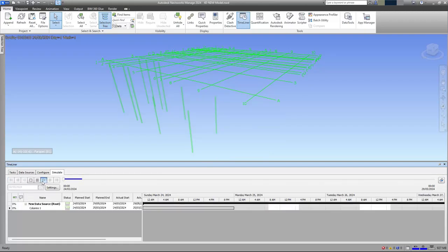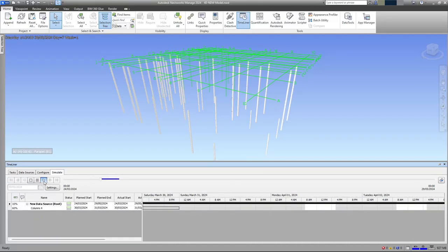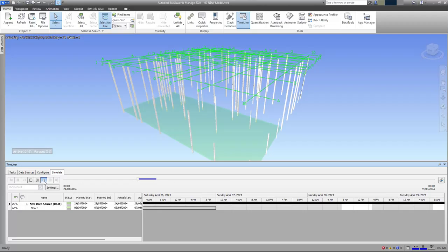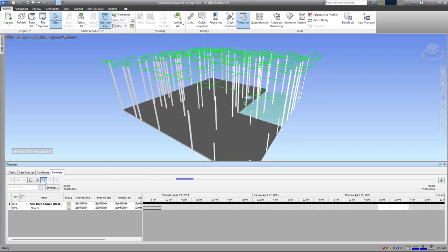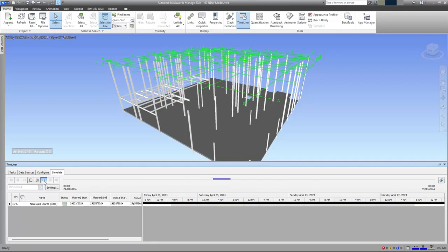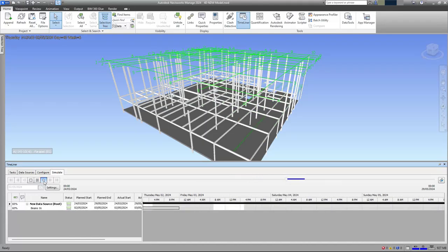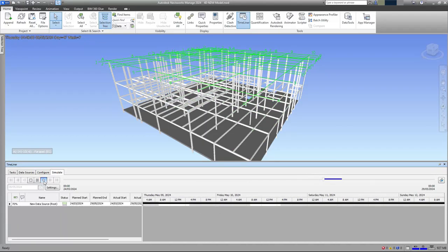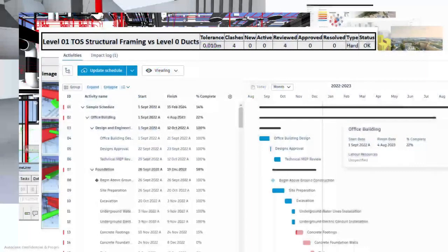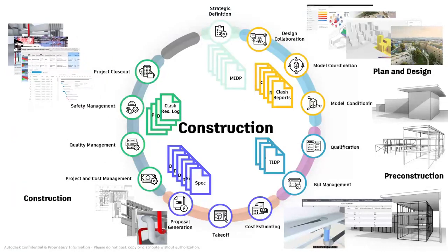Tools like Navisworks Timeliner and 3D point cloud scans of the asset visualize 4D simulations that link the BIM model to construction schedules, and the point cloud scans allow teams to monitor actual progress on site against the schedule. This information, in the form of point cloud models, schedules, and progress reports, are shared on the CDE for all teams to access.